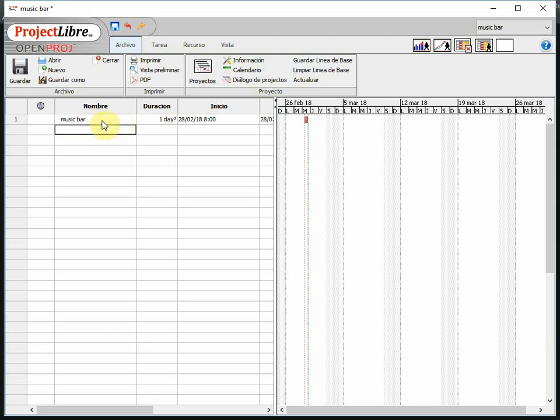We put the name of the project right as the first task. It's not going to be a task, actually it's going to be like the holder, the one who holds everything else. This is why I have to introduce the rest of the different phases on the first level of my WBS.